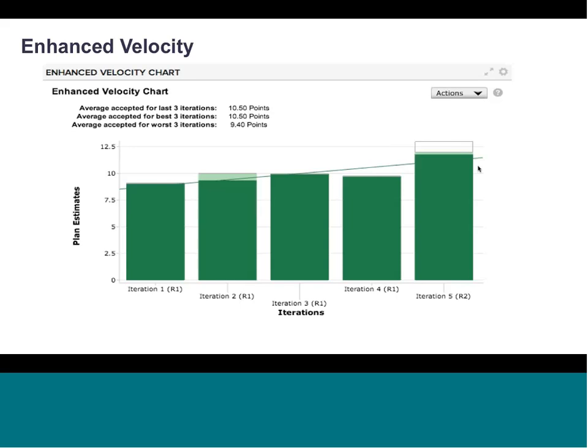Really, especially when you start doing scrum of scrums or big room planning. So, if a product owner wants to complete 500 story points over a certain amount of time, and I'm just pulling a number out of nowhere, we know that the development team can complete, say, 50 story points per iteration, so we're going to need 10 iterations. So we're starting to get an idea of how much work we can do over this big period of time, right? And that's important.